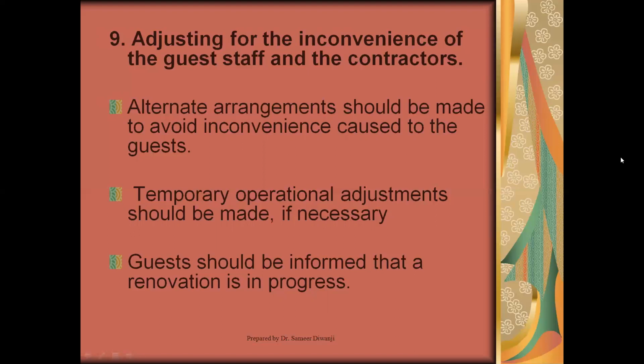I remember another hotel that I worked with, the swimming pool was undergoing renovation. So every guest room, of course, had a note regarding that, a tent card. And every check-in, the guest was informed about the same. And we had made arrangements in a classy upmarket club, which had a swimming pool. So every guest at the hotel's expenses was taken to the club in the hotel car with somebody to escort the guest and brought back if they wish to take a swim. So you have to make alternate arrangements to avoid inconvenience to guests. You have to communicate this to the guest.